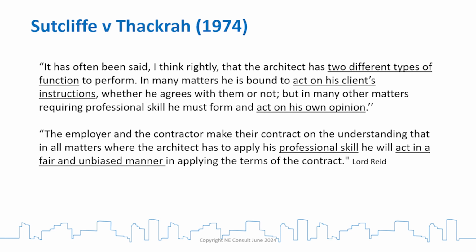Costain-Bechtel confirmed what had been said many years before that, exactly 50 years ago, because that's the year I was born in: Sutcliffe and Thacker. You see this idea that the project manager in an NEC contract wears two hats, two functions. Act on client's instructions is one hat, but the other hat is act on your own opinion.